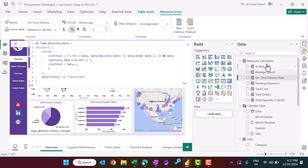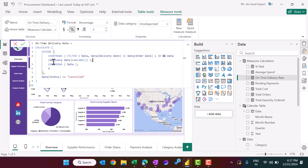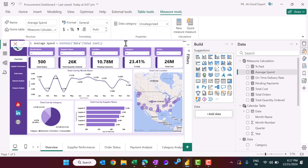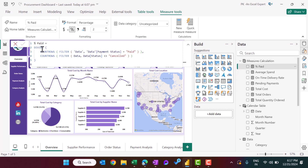For on-time delivery rate, we check if the order was delivered within 30 days of the order date — delivery date less than or equal to order date plus 30 days — and the delivery date should not be blank. Average spend is simply the AVERAGE of total cost. Percentage paid is total orders paid divided by total orders, excluding cancelled orders.